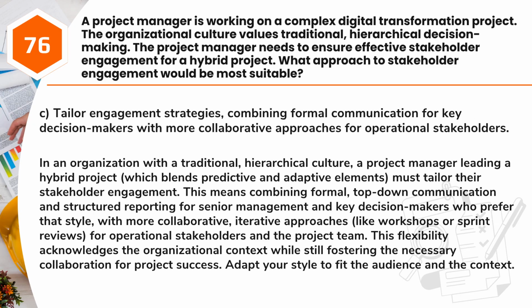Answer: C. Tailor engagement strategies, combining formal communication for key decision-makers with more collaborative approaches for operational stakeholders. In an organization with a traditional, hierarchical culture, a project manager leading a hybrid project, which blends predictive and adaptive elements, must tailor their stakeholder engagement. This means combining formal, top-down communication and structured reporting for senior management and key decision-makers who prefer that style, with